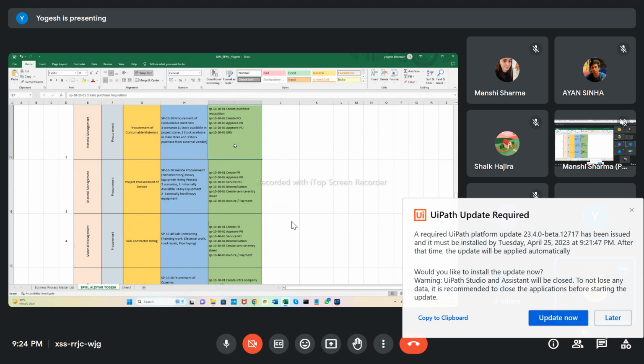Right. Okay. So the project site itself is going to raise the order, and the purchase order copy goes to your supplier, and the supplier is going to deliver to the project site. So these 4 processes.